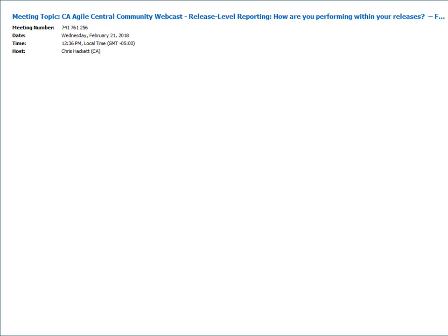They would, and I don't think that's a bad thing, right? You're not necessarily setting off alarm bells unless you look at that chart and you see a bunch of stories that are added and you have no idea where they came from. I think it's not only likely, it's probably even a little desirable, right? As you hone stories, or as maybe not even scope has changed, maybe you define a feature, so you have to add a couple of stories. That's the natural progression when you're doing this PI planning. The point of most of these apps is just to display that, to surface it and make sure there's transparency there. It doesn't mean there's a problem necessarily.